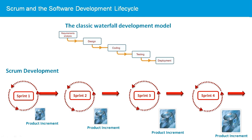As each sprint builds on the current product increment, the product increment grows in functionality with each completed sprint. At the end of each sprint, the customer sees a demonstration of the current product increment and gives feedback, allowing the team to quickly respond to changing requirements and ensuring the final product matches the customer's expectations.